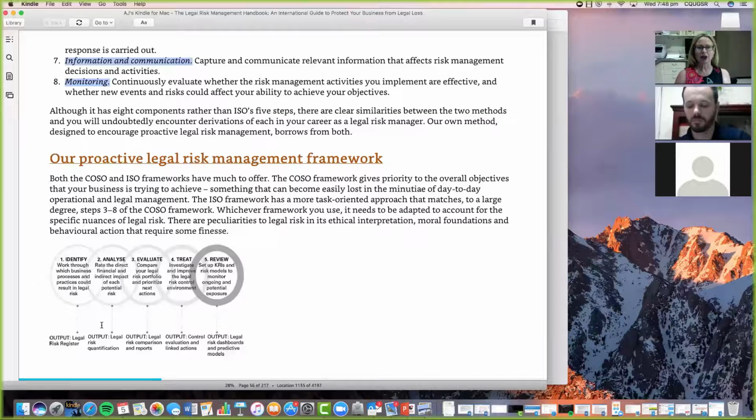And they're getting you to put that hard dollar figure under each, and then they're getting you to reduce your estimate of impact on the firm's reputation to a figure. Okay? And then they're getting you to compare the typical and extreme versions, and down the bottom there, overall risk, you're erring on the side of caution, and you are erring on the side of the highest of the typical and the extreme ratings.